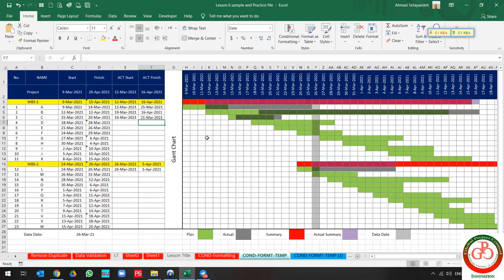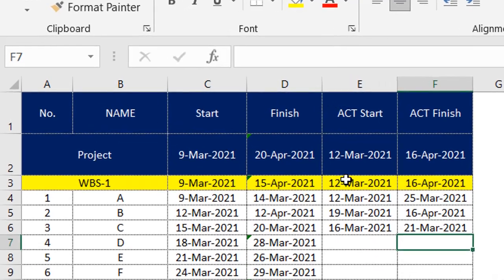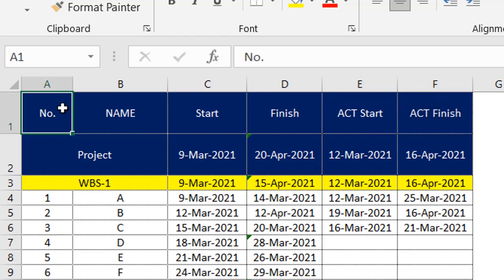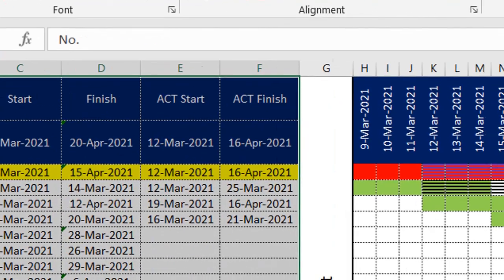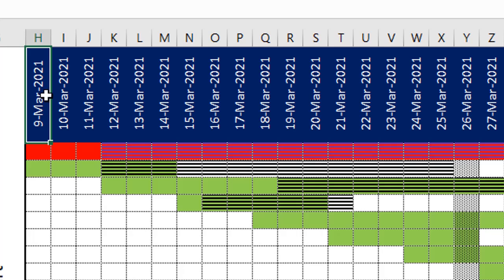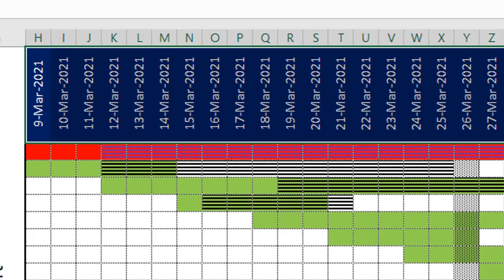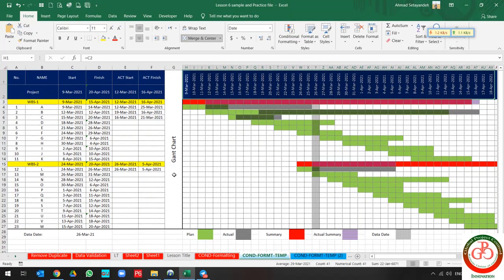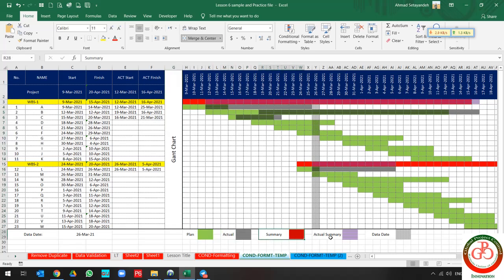Let's do it together. First, you should create your format. You need start and finish, actual start and finish, activity name and WBS name, and also a timetable. It is better to create a small timetable — I created only 41 days. I split it to show the plan, actual summary, and data date.